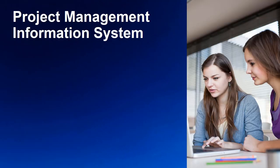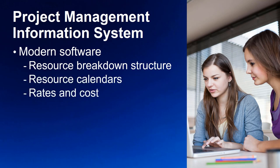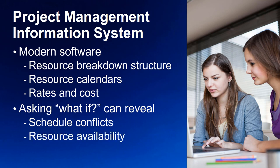The project management information system — particularly project management software — is something you will want to use. Contemporary software is sophisticated enough to consider several factors when estimating resources, such as the resource breakdown structure, resource calendars, and rates and cost. Having these all in one package allows you to create instant alternatives for comparisons, identify potential scheduling conflicts, and spot resource shortages or overbooking problems.